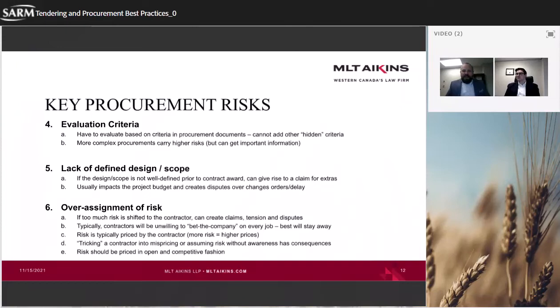This is a project that I'm going to say was in and around 30 million bucks, and I think by the time it finished, the final budget was 70 million. It had something of the nature of 3,000 to 4,000 change orders associated with it, and finished 2.5 years late. And this is what we call a nightmare.